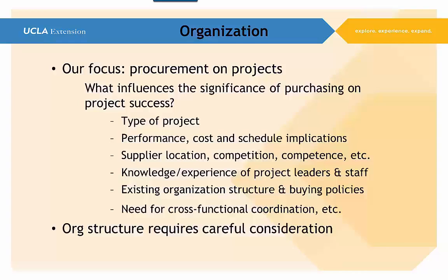And one point is that possibly you only have one small procurement action in your whole project. But if that were to turn upside down and not do well, it could significantly impact your project. And also, because you only have this little procurement activity going on in your project, you may not get a lot of attention from procurement because they've got a lot of other things working, significant, a lot more dollar value, a lot more involvement. But still you've got to figure out how you are going to get attention paid to you so that your procurement action can come off within cost and schedule as well. So there's got to be a lot of knowledge and understanding.